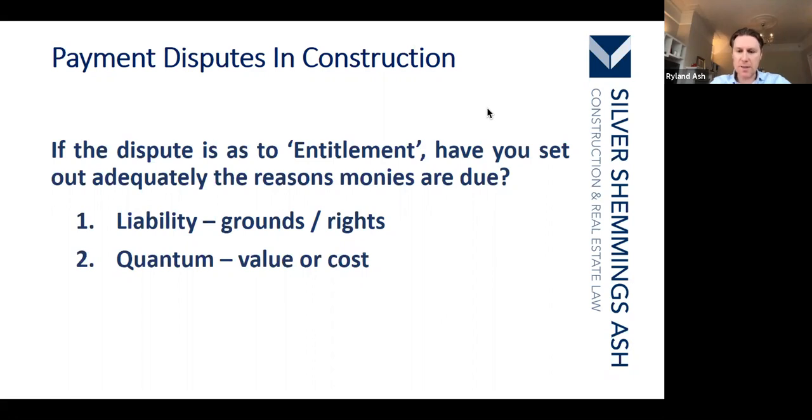The NEC contracts, for example, if you're familiar with them, will talk about entitlement to defined cost, which of course is a cost claim in that respect. And the JCT contracts, by comparison, unless you get down to fair market value in the valuation rules, which is the last one, the starting point is the contract.